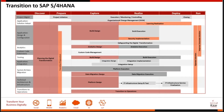Under technical architecture and infrastructure, we decide on deployment options — whether to keep hardware on-premise, use a data center with remote infrastructure management, or use cloud providers. Then there's transition to operations. Going deeper: project management covers all project and quality management tasks, organizational change management, and enablement of the project team at the customer's location. Solution adoption is where you create the training strategy, learning paths, and end-user enablement for the converted S/4 system.